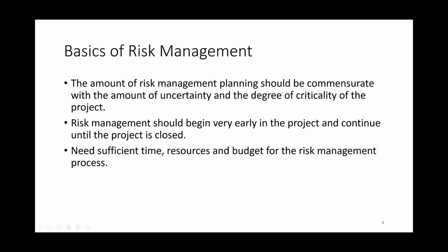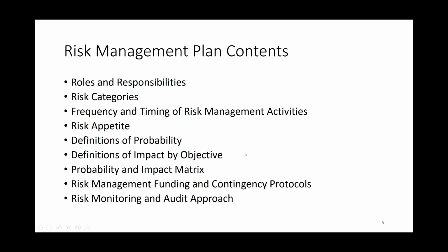and resources and the money to allocate for good risk management, because risk management is hard, and it's hard because we can't define uncertainty. It's hard to think about what are the things that could happen. It's hard enough to stay on top of a project without worrying about what could go wrong. But just because it's hard doesn't mean you shouldn't do it. In fact, it means it's critical that you do it, because once that risk event occurs, you no longer have the option to mitigate it or transfer it to someone else or avoid it. You have got to deal with it, and then it's an issue, and you don't have any other options. So that's why we talk about risk management starting early and continuing throughout the entire project. It's not just a one-time thing.